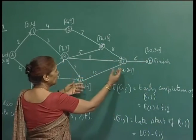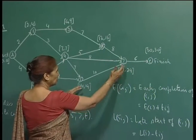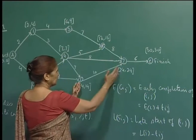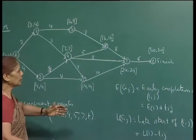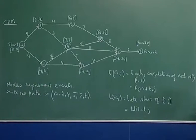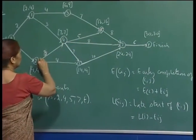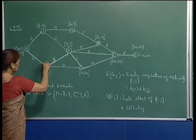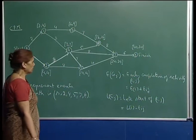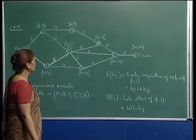To compute the critical path, you check which activities have the same early start and late start — those constitute the critical activities. The critical path came out to include nodes 4, 5, 2, 7, and so on, since each of them has the same early start and late start. Note that the network chosen here is slightly different from last time.